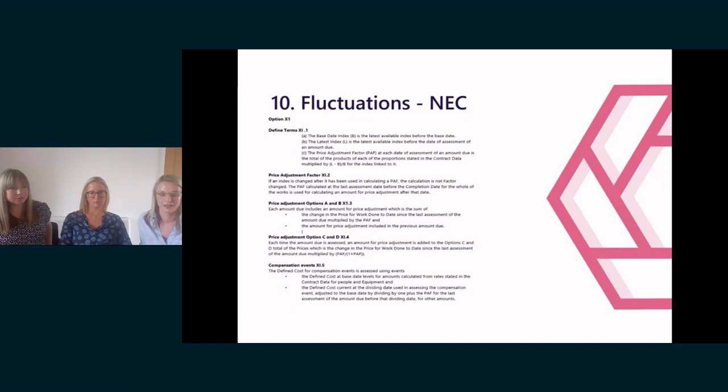This is what we can get, because it really is a 'you get what you're given' kind of market with PI. Otherwise, it's about engaging with your supply chain early and making sure that if that requirement is absolutely on you, you are really engaging with a supply chain who can provide it? Because you don't want to be stuck with an obligation that you just cannot comply with.